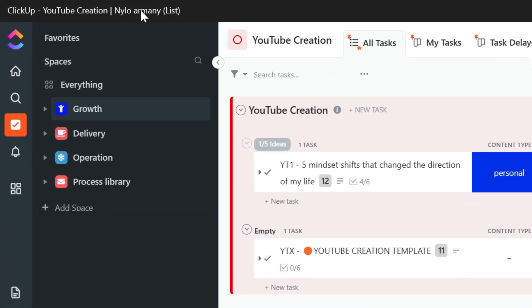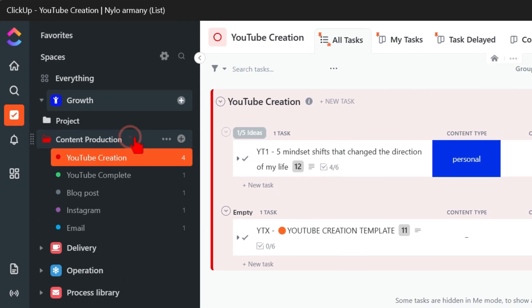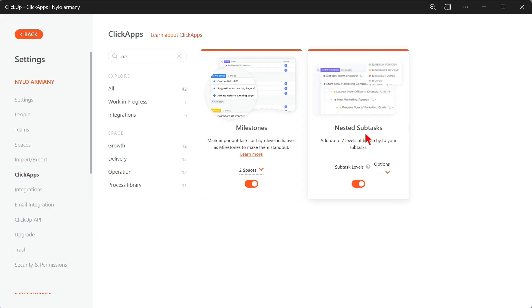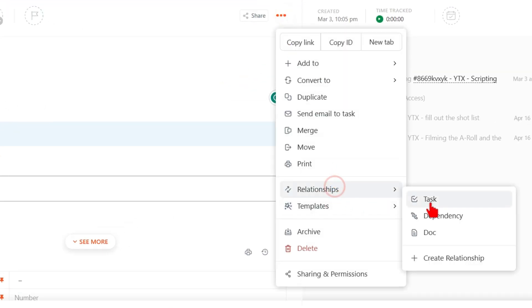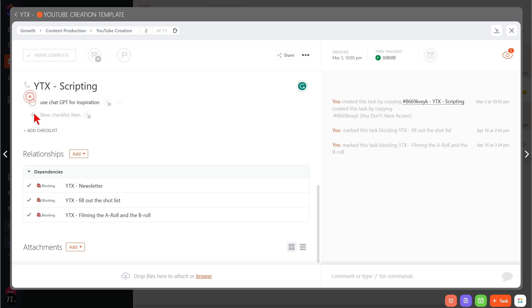Let's talk about the hierarchy of each tool. For ClickUp, at the very top we have Workspace, which could be the name of your business. Then we have Space, which could be a specific area of your life or a department. Then we have Folder, which is optional and could be a project inside that department. Then we have List, where tasks live, and inside a task we have subtasks — you can even enable nested subtasks. ClickUp also has a Relationship feature that you can use to set up dependencies or connect things together, for example marking that one task is blocking another. ClickUp is powerful and fun when you can make it work for you.